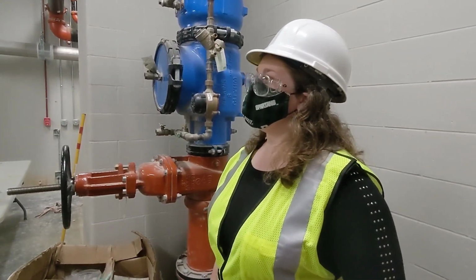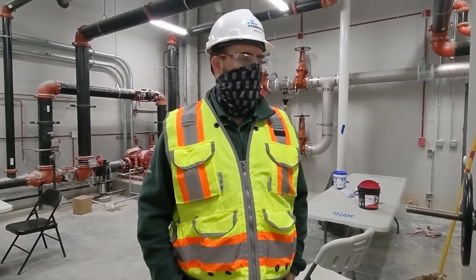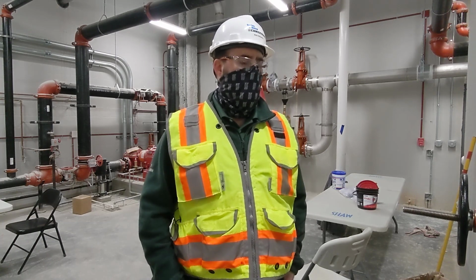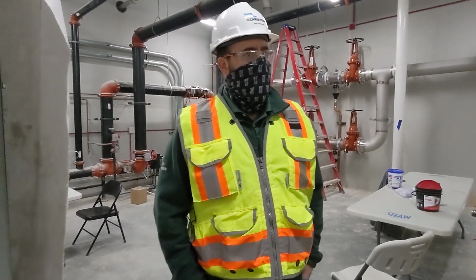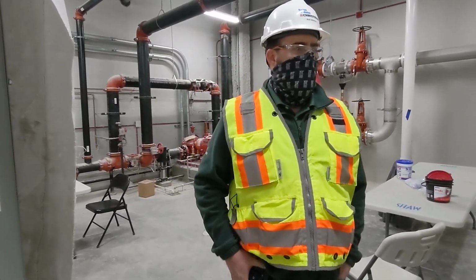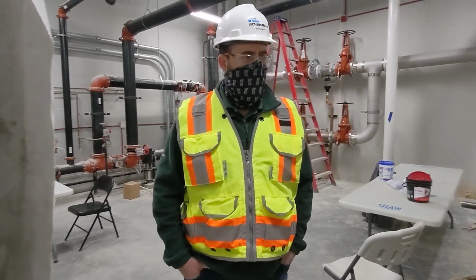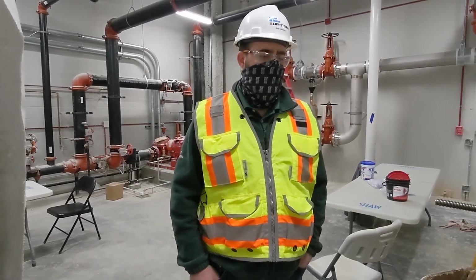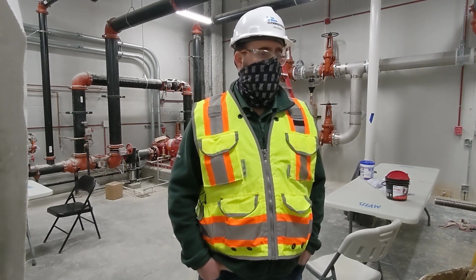So, how did you guys handle procurement on this job? Yeah, so for all of our major mechanical equipment, we had a collaborative approach with the owner and the subcontractors, to get together as a team and determine what brought the best value to the job, and pick and choose different options that made sense financially where the need was in the building. It went really well for us.